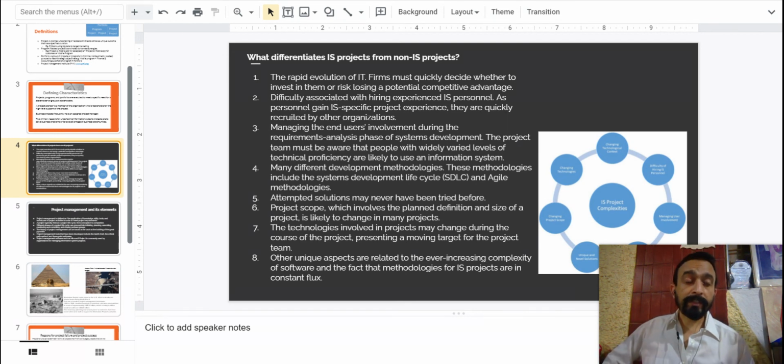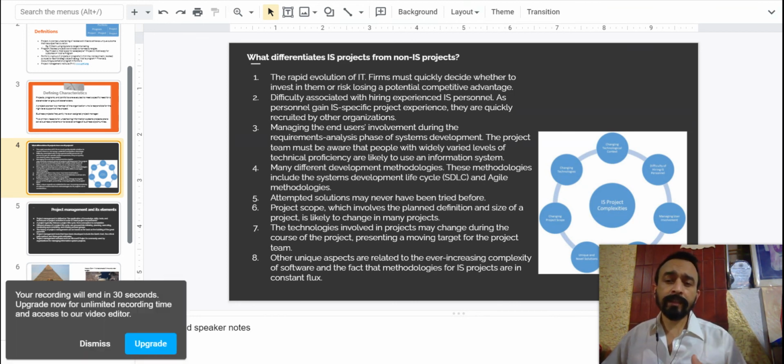The other problem is communication with the client. Usually clients can't express what they want. Think of somebody older in your family who's having trouble with the technology. They can't always express what they want, and once they have somebody helping them, they'll say, oh no, actually I meant this, and I need help with that. And so the project scope would keep changing. These are the big problems with IS projects.